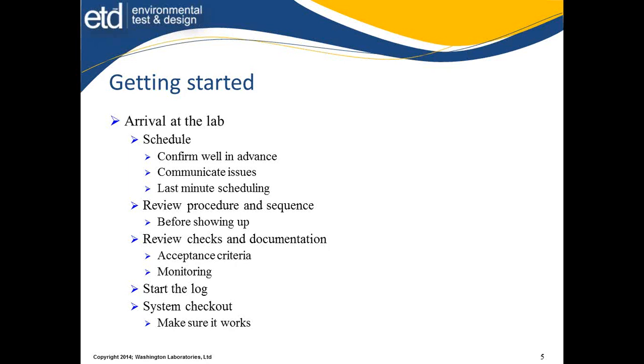This review of the procedure and test sequence needs to occur, especially if there's any special sequences. That lab needs to know what assets need to happen when. So coordination of the testing is clearly something that needs to be dealt with, especially when particular sequences are there. Do you need to move the equipment from one test area to another? Maybe you need to be in 3 or 4 different buildings at the test facility depending on the test program. This should be gone over clearly before.